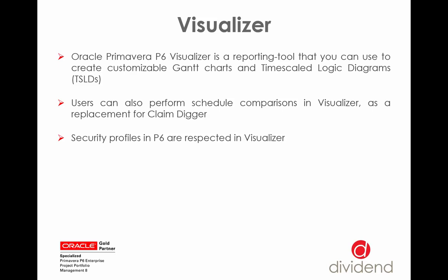Users can also perform schedule comparisons in Visualizer, and that's a replacement for Claim Digger that you may have seen on the Tools menu previously. Any security profile that you have assigned in P6 is respected in Visualizer, so if you don't have access to a project in P6, you won't have access to view that project in Visualizer.